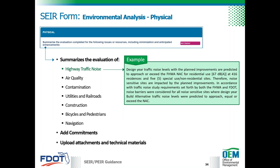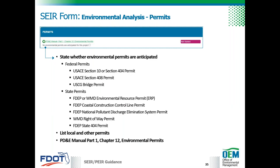The physical resources section includes various subsections. The permit section allows selection of federal, state, and local permit types that will be needed for the project. These should have been identified through coordination with permit agencies and the permit coordinator during the environmental analysis. More information can be found in Part 1, Chapter 12 of the PD&E manual.